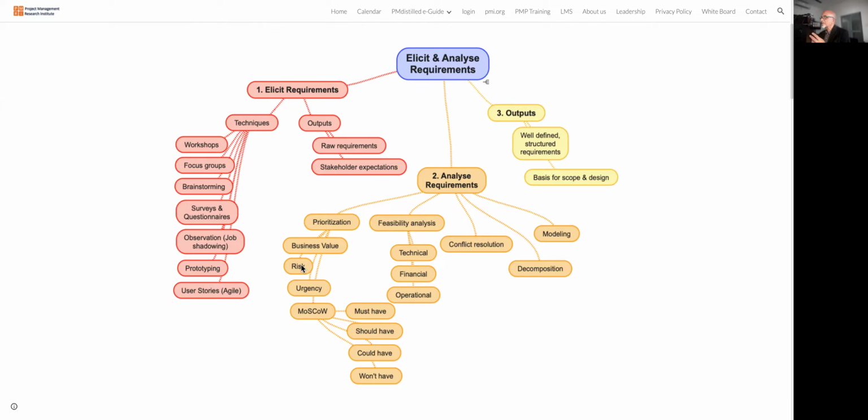We have only two choices: either ignore it, avoid it, or straight away bite the bullet, because it may generate a lot of business value. In such circumstances, we want to do the high risk items first. That means when I do a high risk item first, even if it fails, the rework component will be lesser.